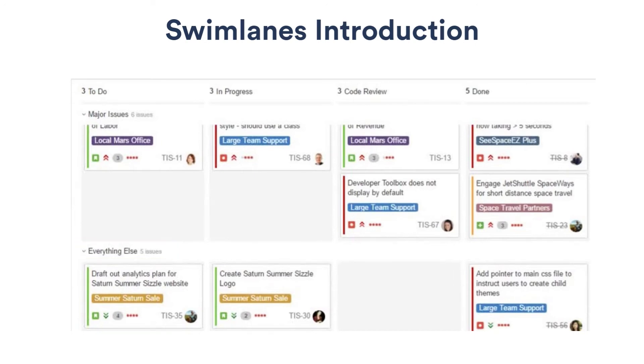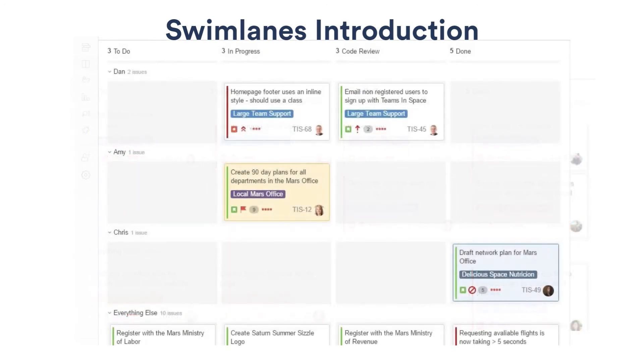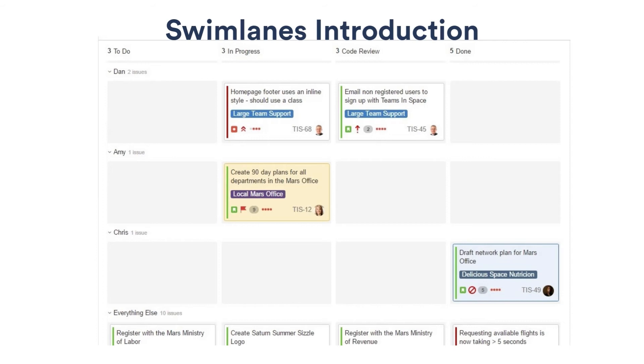The rest of our issues are put into the everything else swim lane at the bottom of the board. This is the primary way we set up our swim lanes as a team. Another popular configuration is to group issues by assignee. That way we can see exactly what everyone is working on and their progress. This helps us watch out for bottlenecks and overloaded team members.